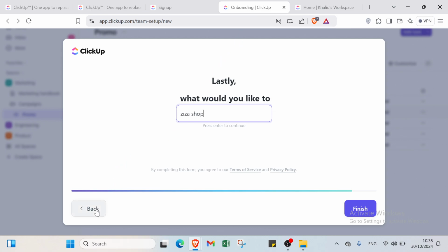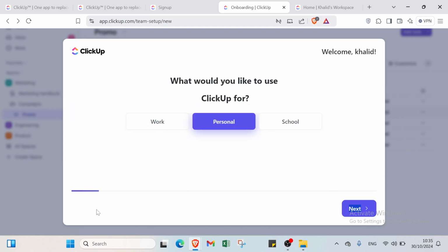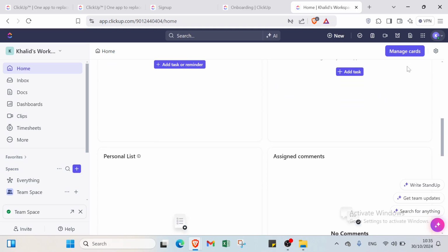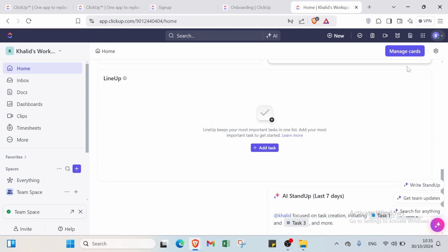Next, you have just to create a project by adding folders and lists to organize tasks effectively. And then you have to add tasks within those lists, assigning due dates, priorities, and labels for better tracking. Then utilize views like calendar to visualize your work, or Kanban. Finally, explore automation options and integration with other applications to enhance collaboration and streamline your workflow.